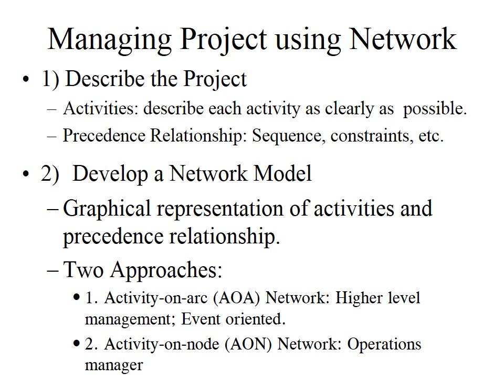So how do you manage a project? I'm going to give you a very simple, very brief 20-second description of what it takes to manage a project. The first step is you describe the project in as much detail as possible, describing each activity and the sequential relationship and other constraints among those activities. And to better manage the project, they typically use a network model, which is nothing but a graphical representation of all the activities and precedence relationships and when you need to start the activities and so on.